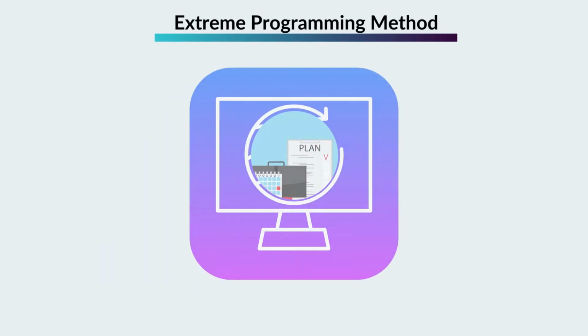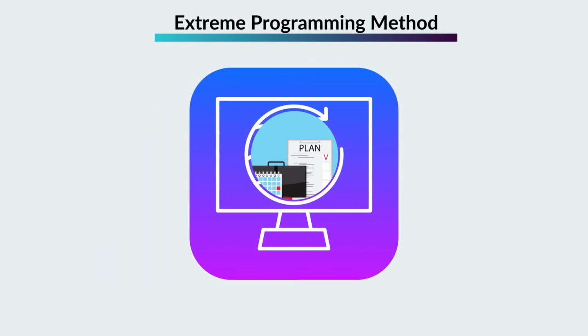Extreme Programming method. One of the most prevalent and popular practices in Agile methods is known as Extreme Programming, XP, proposed by Kent Beck. It has been designed to deliver high-quality software products in less time, focusing on collaboration with customers to work together and achieve a common goal. XP is well suited when the software requirements are changing frequently, the development team is small and co-located, and the technology used allows for automated and functional tests.